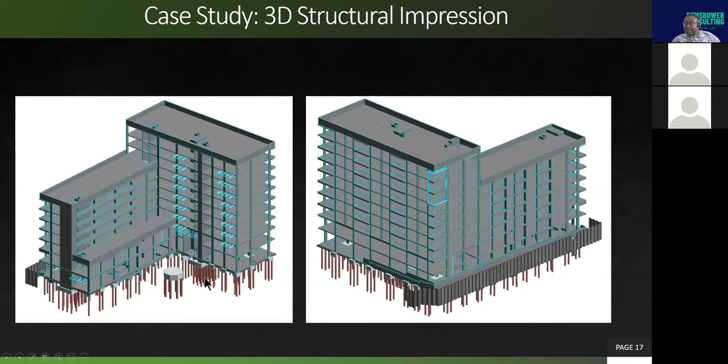If I'm talking about piles, these are the vertical bits going into the ground. So the ground bits, all of these up to the underside of the ground floor slab, these are all below ground. They are the substructure works like I was telling you about. So the scheduling we are looking at today is all the substructure work, when you put in your piles and your pile caps, up to the underside of what I'll refer to as the ground floor slab, okay?